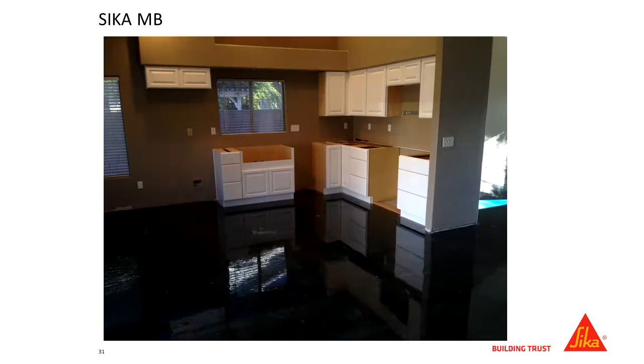Here you see a picture of it installed. You see that mirror-like finish that I referred to. The SIKA MB primer cures out in a dark blue color. This way you can see all the areas that you've hit. It's a single coat. So unlike some of the competitors that say, okay, you've got to hit it with one coat, come back again and hit it with a second coat in a couple hours, this is a single coat that can handle up to 100% relative humidity. It cures in about 6 to 8 hours, depending on the temperature. And once it's cured, you're ready for finished floor. You're ready to do your finished floor prep over top of it.